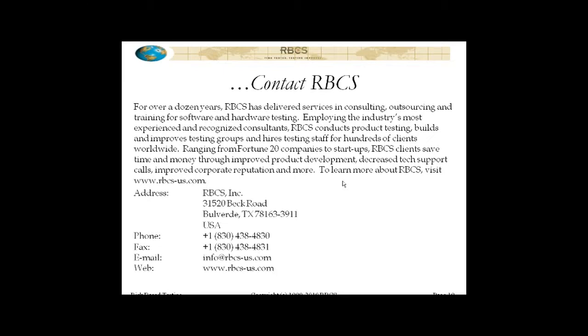And then you would make those adjustments. What's important is that those adjustments ripple through into your testing. So through the traceability of your risks to the test cases, you push the new risk priority numbers down into the test cases that you've created.